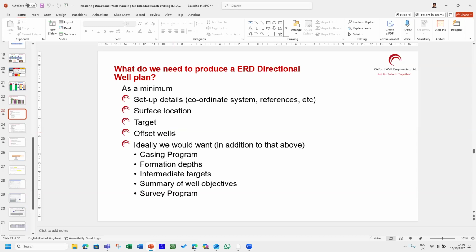If nothing else changes, you will call it Rev A, Rev B, Rev C. Now you upgrade the plan from look-see to Rev A, Rev B, Rev C. Similarly, at one point, people sign off. People say, okay, this Rev H or whatever is the one that everybody agrees, no more changes allowed.